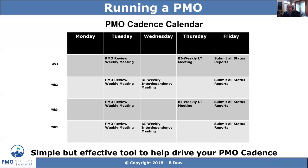But as a PMO manager, one of the first things that you can get set up is, how am I going to operate my organization? Get it up on a SharePoint, get it up on a calendar tool, wherever the case may be, but you have a PMO cadence calendar set up, and you're driving to that cadence. And your team members are driving to that cadence as well, and they schedule all around this because these are the things you want to make sure you're setting up and they're doing as you go through the weeks.